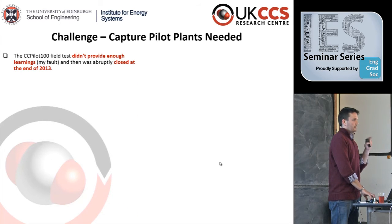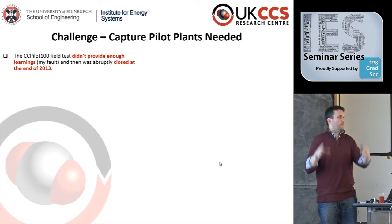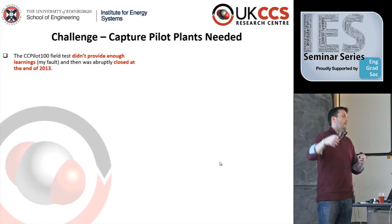Problem is that real timelines exist, and they kind of screw you up. So basically, by the time that I had created this sensor, put it on the aluminum plate, and put it at the plant, the test program had already moved on past the data that I needed that was useful. And I knew that ahead of time, and I was saying that's completely fine because there was this assumption that they were going to come back around and do the whole thing over again with more accurate data to be smarter, and I was just going to catch the whole thing on the second pass,